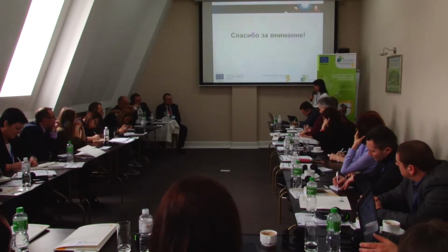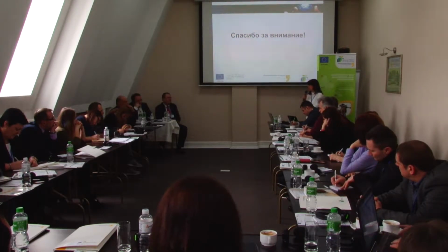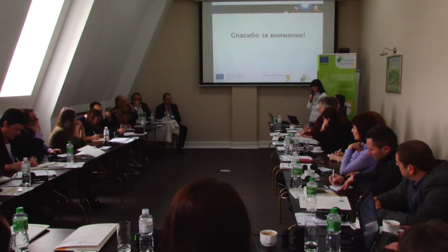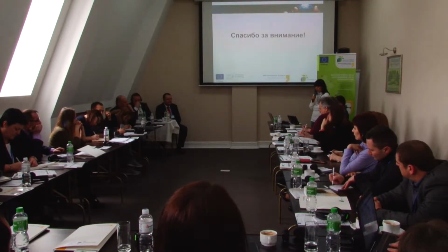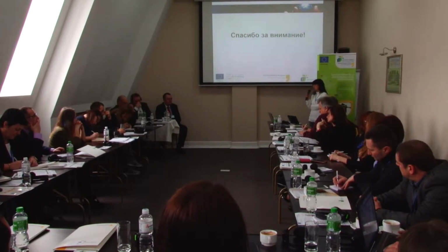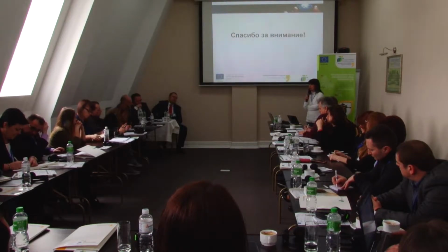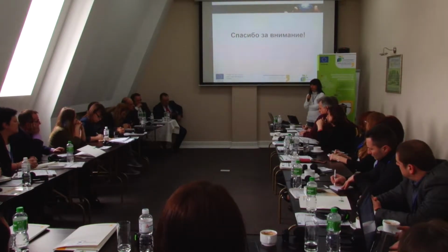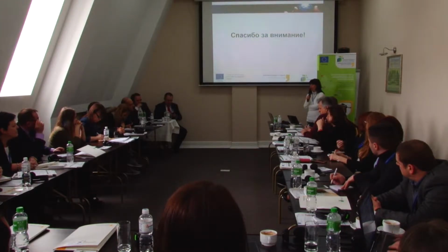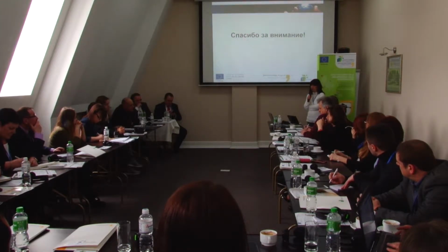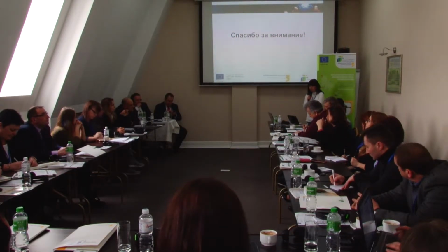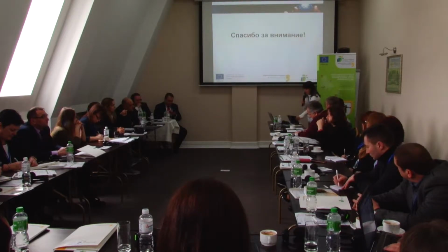You also need to provide him with the data of the energy audit, because he must get acquainted with this data. And there is also the EU technical guidance on the thermal refurbishment of buildings, which also needs to be given as a supplement, as an attachment to these documents. Beside that, together with the support team, we have developed the guide for the design. So I think that if you finally approve it and decide to use it, you can use it. The designer needs to understand what scope of works he will have to do.